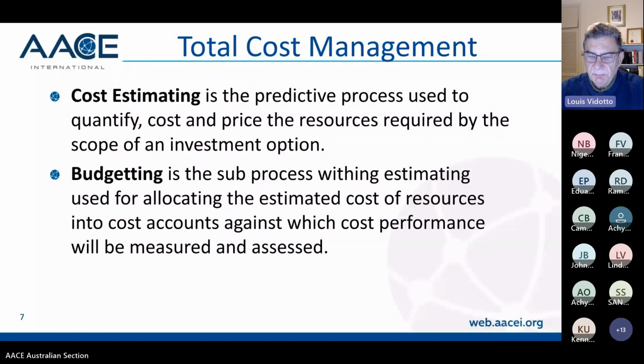the budget in accordance with the scope of that work. So we always say that budget allocation is based on a scope for scope basis, not a dollar for dollar basis. And in order to do that, you need to understand what the scope is and how well it's documented in the estimate/budget. So again, the estimating process becomes a key part of the project process. And I can't reinforce that enough. Building an estimate, it's not only about what is the cost going to look like for the project. It's really being able to give it to the project team to manage the budget and help to manage the project.